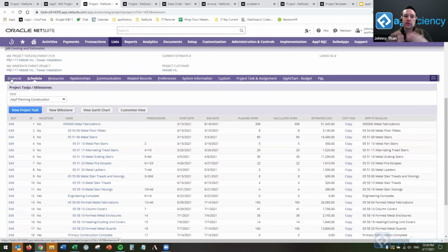And again, this cost will go up as I go through my budget. I can see my revenue progress and my cost progress as a colorized bar chart against each period of the window that I'm looking at for my project. I can see my performance against each metric in the period as well. And more importantly, these are my favorite lines. I can see where my cost trend is going to be breached. So my cumulative actual cost is the green line.